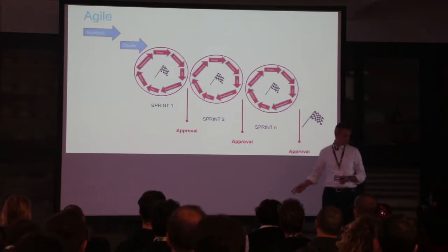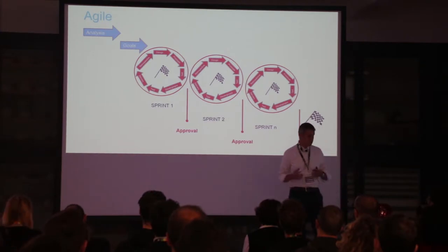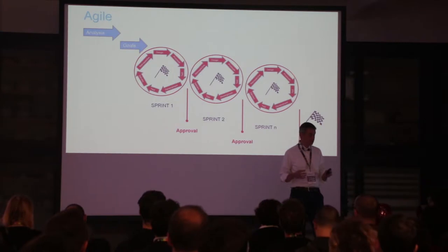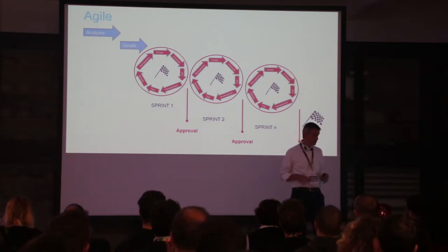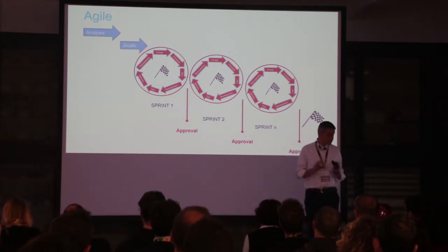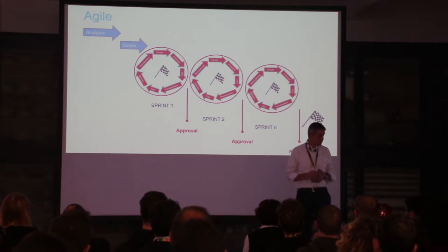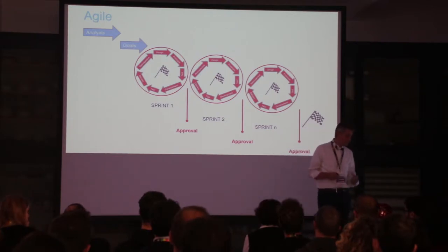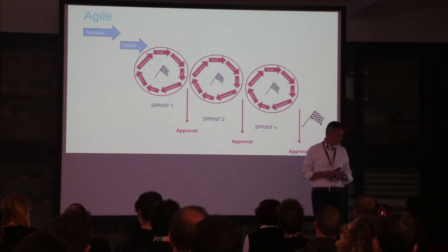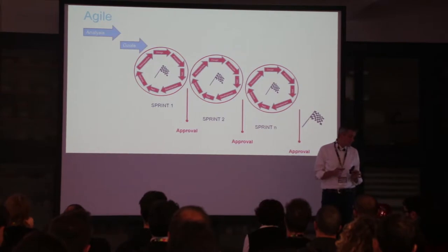And in the agile process, professionals gather in teams. Stakeholders define the concept of a product or a service, and the heads of each of our departments gather a cross-functional team of professionals on the basis of the particular skills that are needed. The team breaks product development work into small increments, iterations or sprints, which are short. This minimizes overall risk and allows the product or the service to adapt to change quickly.